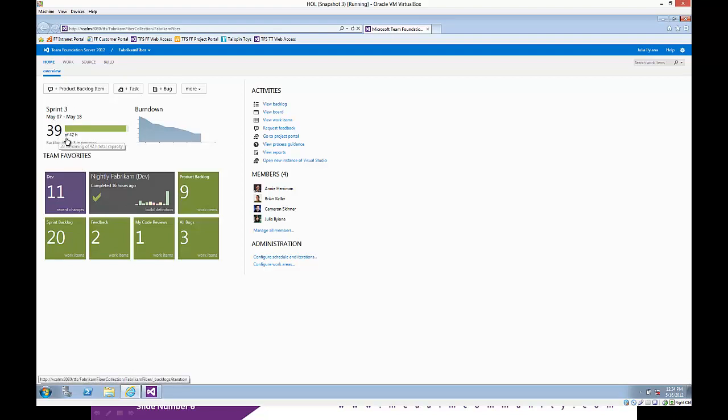And it shows you the number of hours that is basically the capacity of your project, let's say how many hours your team can commit for this project. In this case, it's 42 hours within the 2 weeks. So for this project, they're running 2-week sprints. They're committing 42 hours, and we're assigning tasks worth 39 hours. So there's still room for 3 more hours there.